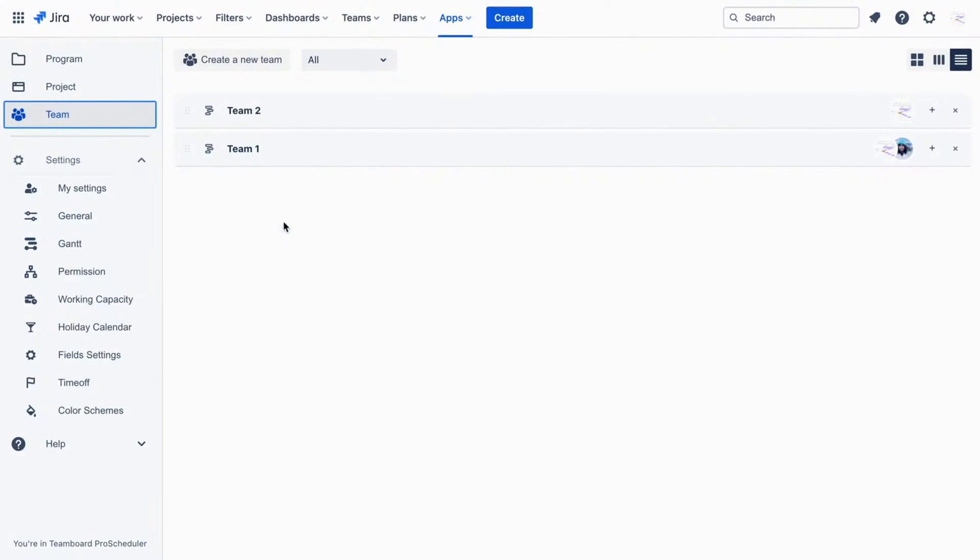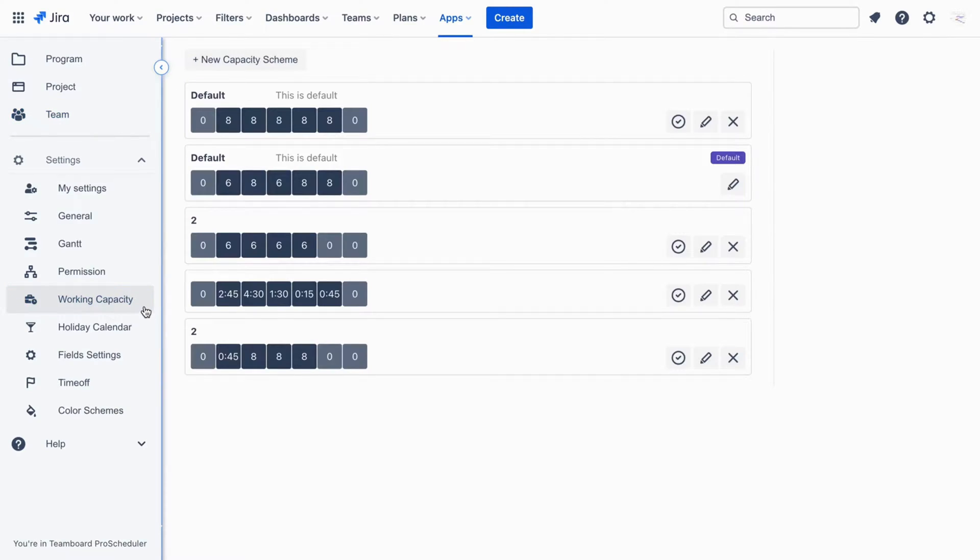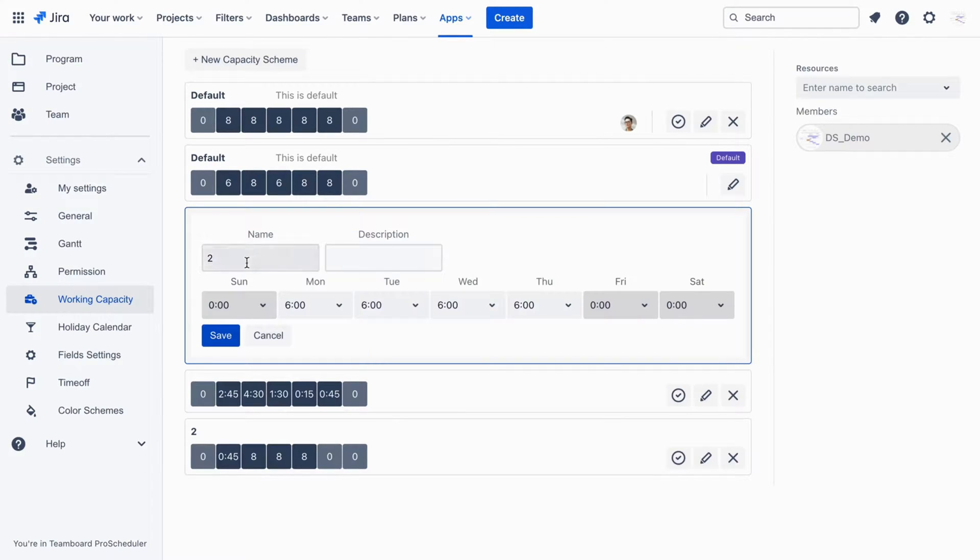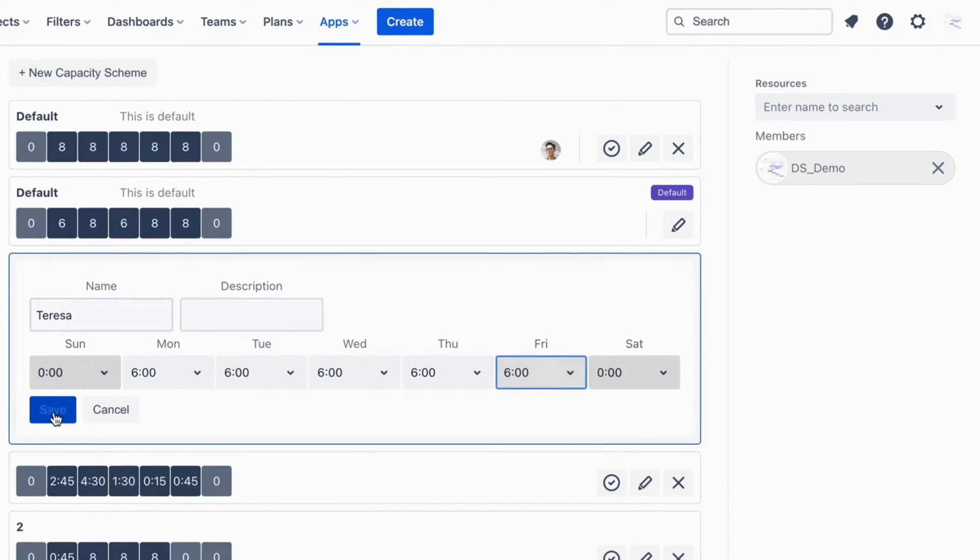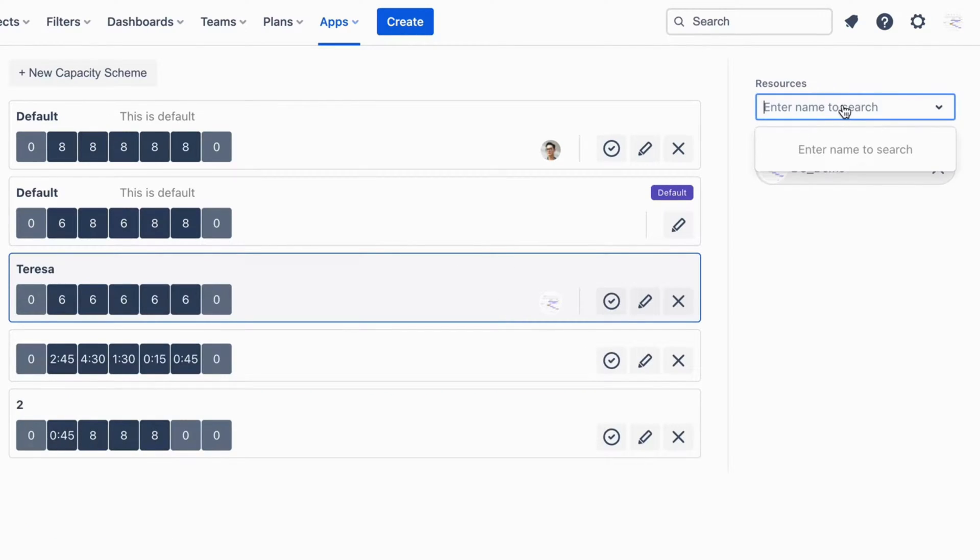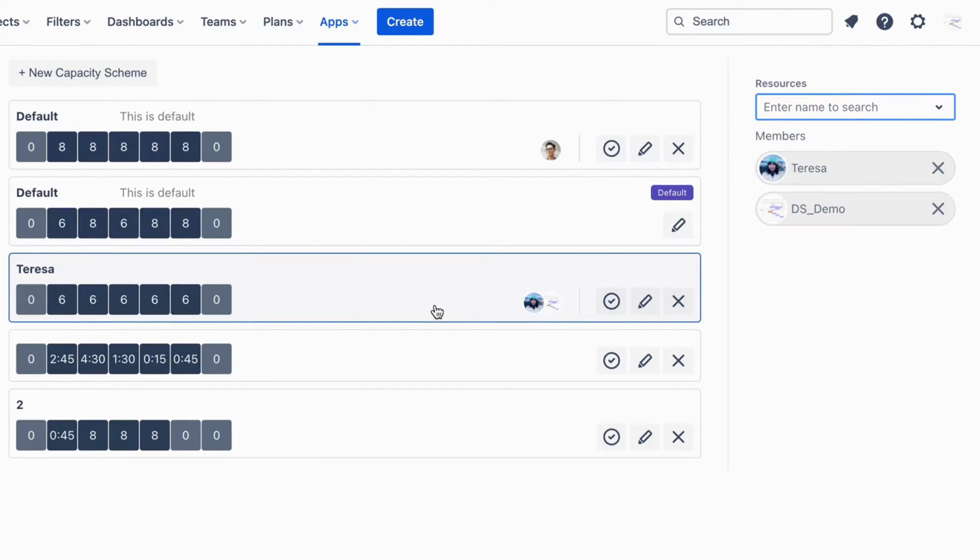Manage resource working capacity. Navigate to Settings and select Working Capacity to efficiently manage resource capabilities and ensure balanced workload distribution. Let's manage Teresa's working capacity - let's say 6 hours per day. Navigate to Settings, select Working Capacity, and set Teresa's capacity accordingly.